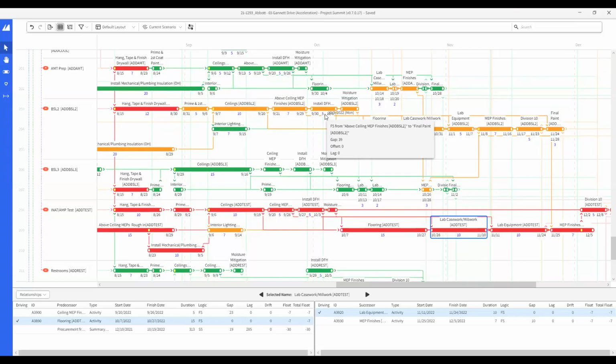The next question is: is the Primavera P6 schedule imported into NetPoint, or is the schedule built from scratch in NetPoint? Okay, you can actually import a schedule, and we have done it. The thing is that if the schedule is over 500 activities, it tends to be very slow. So when we're using NetPoint, especially for a risk analysis session, we usually develop a new schedule. What I like about developing it is that you're reviewing all the logic at the same time that you're building it up.